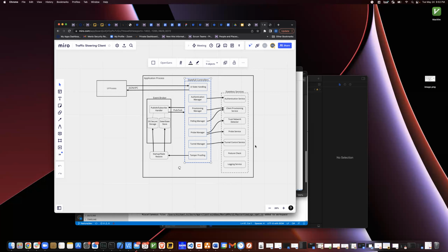Yeah, I think, Mike, that will be a later discussion, right? But our goal, what we promised for this year, is Windows. The stretch goal is Mac OS, and any mobile devices are next year. So if we make a compromise, we have to get Windows complete. We have developers who can do Mac OS in parallel, but the main focus is to complete Windows. I'm not sure, Tip, if you found another candidate, but I think Mike and Mike P are working on the Windows side.